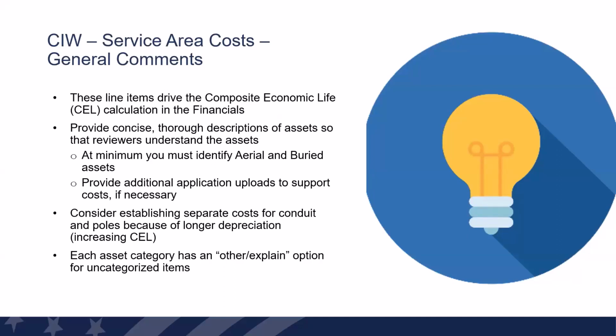Service area cost and general comments. These line items help you derive the composite economic life that sets your term for a loan and your commitment or obligation for a grant. At a minimum, you're going to have to identify the basics. Is it aerial? Is it buried? I think you should do a little more than the minimum in identifying the asset.